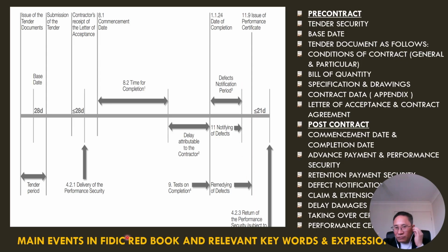And according to FIDIC, after the defect notification period has expired, that means the time has ended, usually the contractor will have no obligation to repair or rectify any defects that occur.